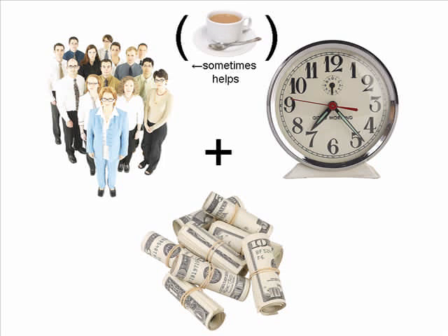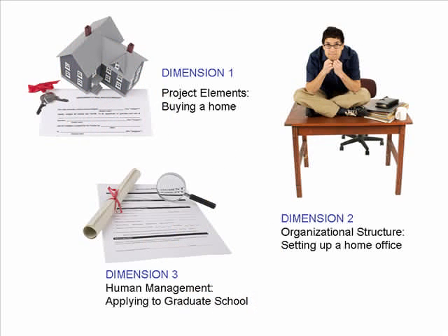For example, if you need more people to complete a project, more money may be required. If you need to shorten the time it takes to complete the project, more money or people may be required. Rarely does balance remain, but knowing which items are under the most pressure or in the most jeopardy will help with decision-making and communications between teammates, your sponsors, your professor, or your funding sources. Here are some quick examples of life experiences applied to the 3 dimensions that influence projects.